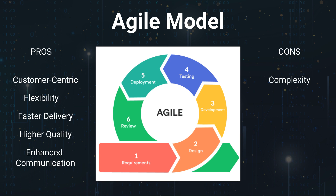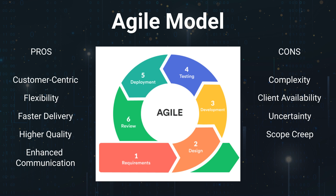Cons of the Agile Model: Complexity in Large Projects — Agile is well-suited for small to medium-sized projects, but in large, complex projects, managing multiple iterations can become challenging. Client Availability — Agile requires active client involvement throughout the project, which can be demanding on clients' time and availability. Uncertainty — Agile's adaptive nature may introduce uncertainty for stakeholders, who may be unsure about the final product until later in the development process. Scope Creep — the flexibility of Agile can lead to scope creep if not managed properly, as new features and changes can accumulate. Documentation — Agile often leans more towards working software than comprehensive documentation, which may lead to challenges in documentation-heavy industries or regulatory environments. The Agile model is highly effective when applied in the right context, but it's crucial to recognize its limitations and select the most suitable model for the specific project and organizational needs.